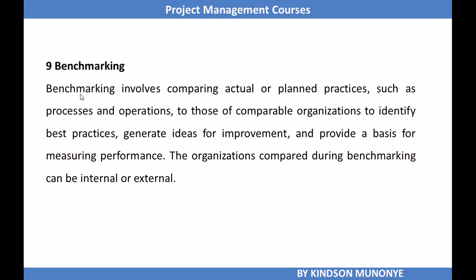Benchmarking is another tool and technique used in collect requirements. It involves comparing actual or planned practices, such as processes and operations, to those of comparable organizations to identify best practices, generate ideas for improvement, and provide a basis for measuring performance. So the organization compared is the benchmark. Benchmarking can be external or internal.